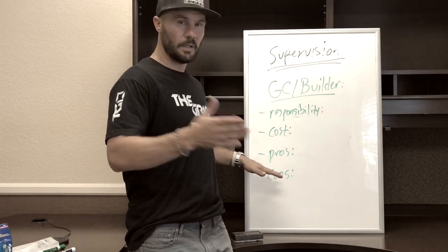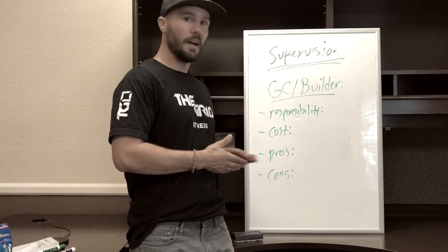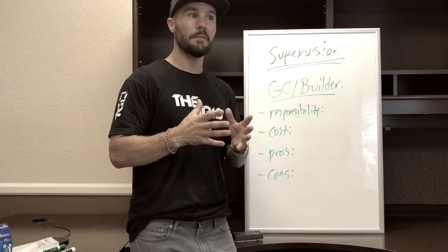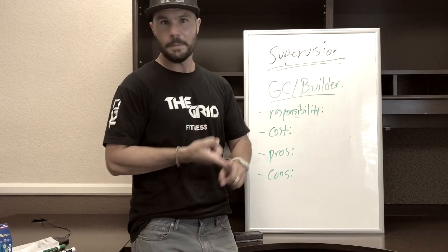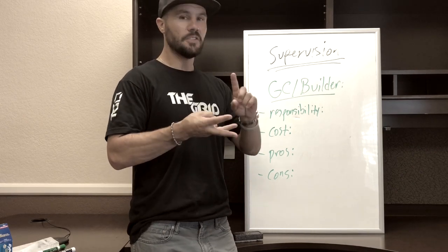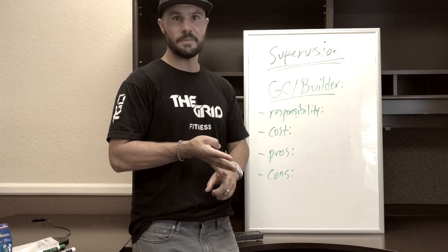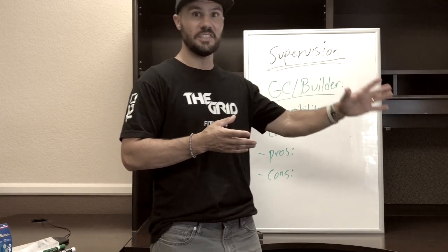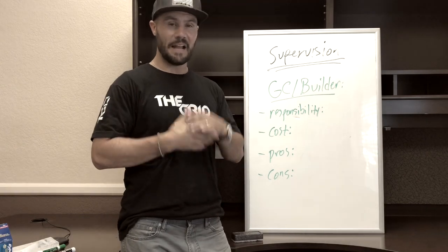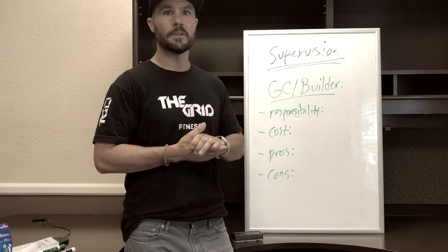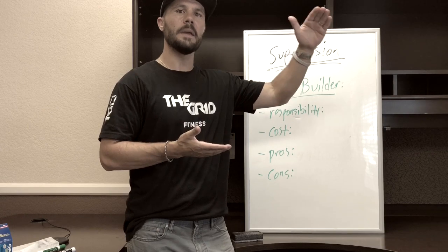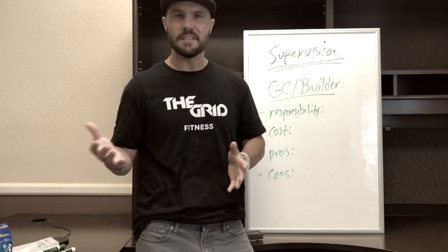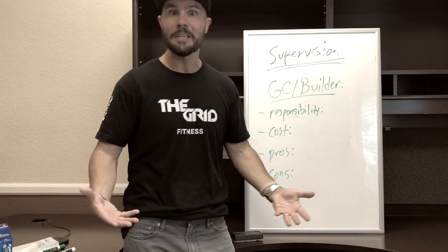Now the cons are, and I'll come back to when it's ideal, the cons are because you're giving up that control, you're putting all of the pressure, all of the ownership on keeping to the budget, keeping to the timeline, doing quality work, picking subs that are good and reasonable and fair priced. You're putting that all on your GC. The tendency that I found is that your GC builder, the costs tend to go up and up and up because they're not motivated to get lots of bids and to save money on cost. Why would they be, right?